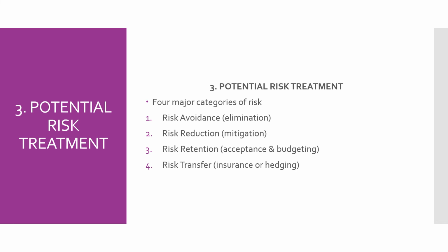So risk retention can be beneficial in any of the following ways. First one is when the charge for risk transfer to an insurance company is considered. In case of risk retention, there is a charge for risk transfer to an insurance company, which is generally 40 to 50% more than is paid in losses.